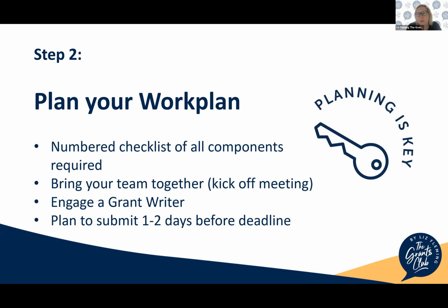And I always at this point like to plan ahead, making sure that we can plan to be submitting a couple of days before the deadline. A couple of reasons for this: we don't want to be rushing right at the end. Nowadays, most of the grant applications are through electronic portals where you have to have a login and a password, and we submit through that. So there's always that issue of tech, and we don't want to be submitting at 10 to midnight.